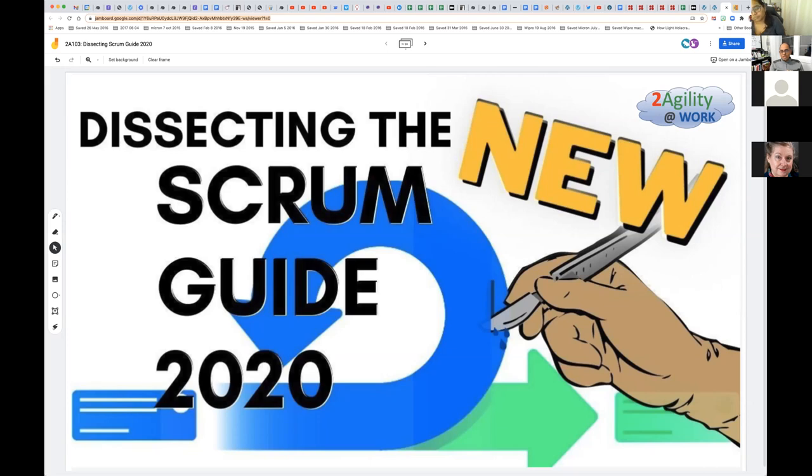When you have two cooks trying to cook a product, it doesn't work. Though there might be a multitude of stakeholders who are supporting the product, in the product context, there's only one decision maker for the product who decides what happens in the next sprint. And if you clearly look at it, the only thing that the product owner does is ordering of the backlog, in what order this work should be done.